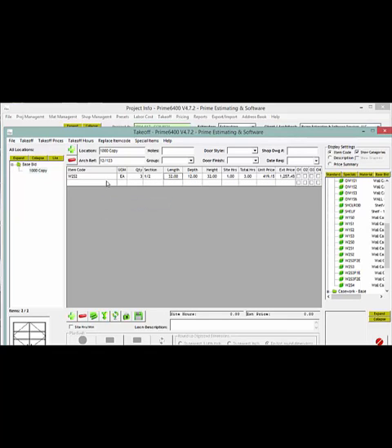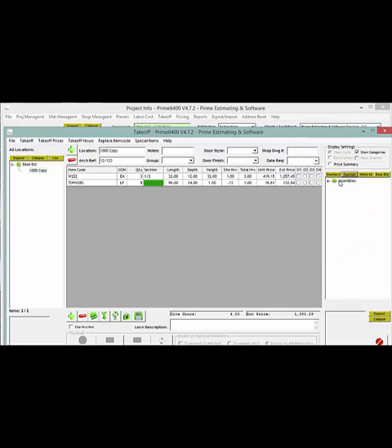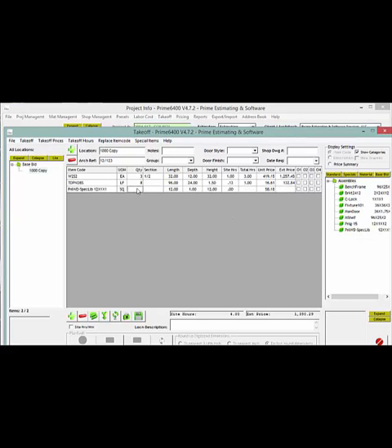We can right click to add a row. We can also down arrow. We can also pull down and select an item, for example, countertop. And we'll fill in 8 linear feet of countertop. And that comes up with your pricing complete with your hours and manufactured costs for that. We can further come across here and select special items. These might be assemblies already dictated on this job as being a special item, and those can be dropped and dragged into the takeoff area for you.